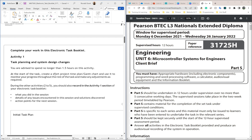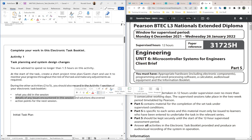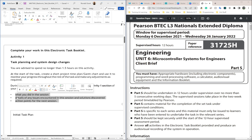At the start of the task, create a short project time plan or Gantt chart and use it to monitor your progress throughout the rest of the task, making adjustments as required. During activities two to five, record in the activity one section of your electronic task booklet: what you did in this session, details of any issues encountered and solutions discovered, and action points for the next session.